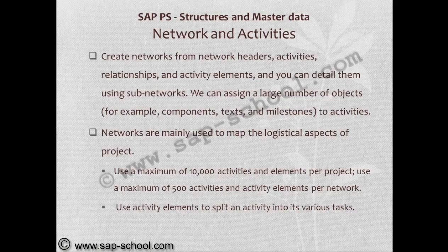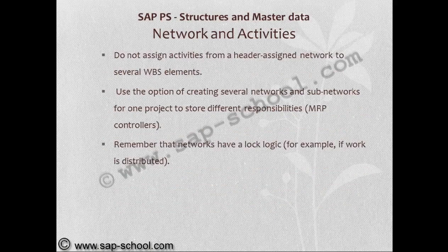Use an activity element to split an activity into its various tasks. Do not assign activities from a header-assigned network to several WBS elements. Use the option of creating several networks and subnetworks for one project to store different responsibilities. Remember that networks have a lock logic. So if you follow these tips, the utilization of networks will perform in a better way.